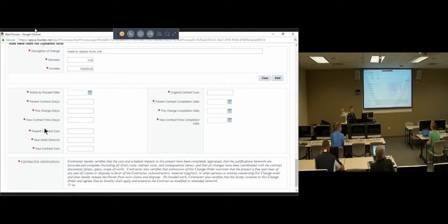Why is this manually being put in when you've already changed your statement of values to come up with whether it was an add or deduct of $150,000? Because then you're putting the data in twice. Yeah, one is a data entry screen, the other one is directly tied into the cost module. So in other words, when it finally gets approved, it automatically increases the contract cost or decreases depending on what the request is. Still the one form, or the one process technically. It is one process, yes. It's just one place is for data entry, the other one's for actually updating the contract. At the same time, there's a mail merge that is produced later on when we get into the change order process. So it needs to pull in that data in that method. Yep.